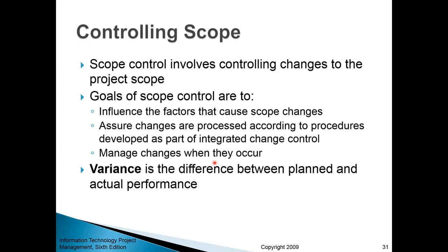If you decide to go ahead with this change, then you need to manage change. I mean, you cannot just say, okay, let's change it, right? You need to follow through. You need to make sure that whoever is responsible for the change has enough resources, has enough authority to accomplish the change. And at the end, you need to follow up. You need to ask this person, so was this change implemented or not? Otherwise, you'll be just talking and wasting everybody's time.